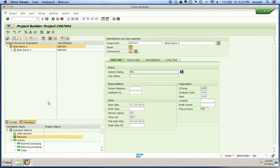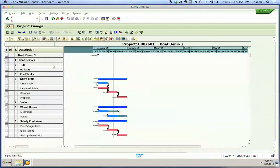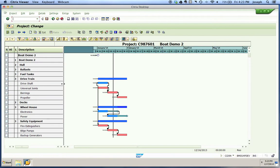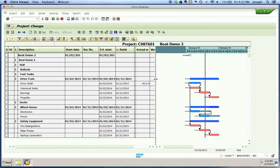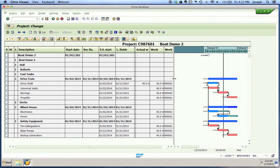Now we can go back and confirm this in our project. We'll reopen our project, extend it, and go back into our Gantt chart. You'll notice that we confirmed activity drive shaft for 40 hours of work — in our actual work column we've confirmed that. The graphic also changed to represent the fact that it's been completed.